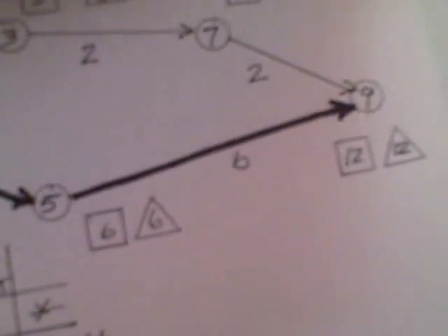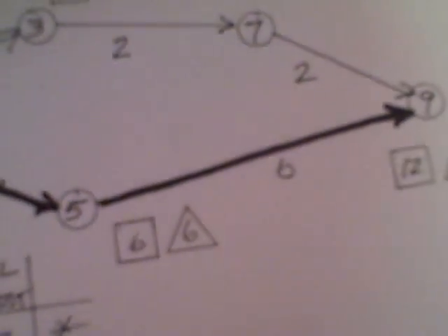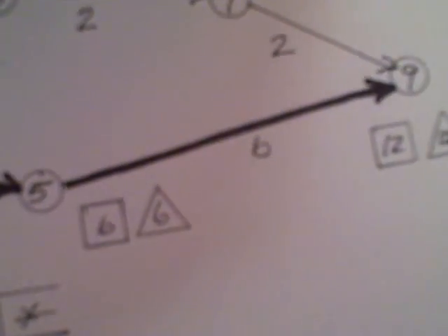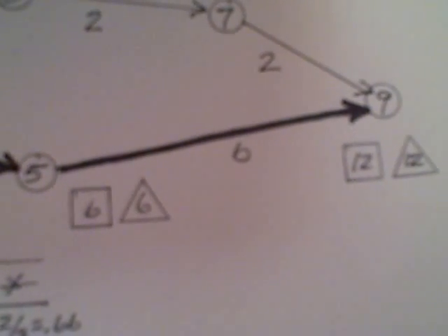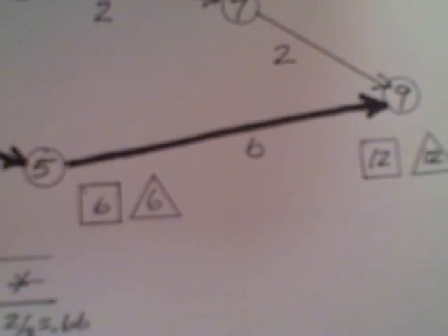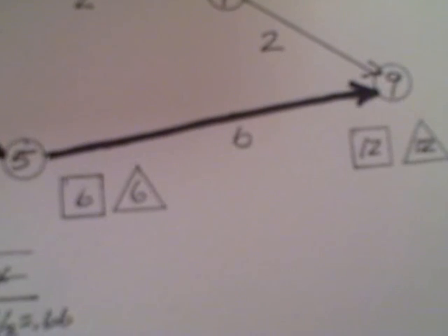And the way we do this, we choose, is based on what we call the cost slope, which is a ratio. It's just like if you're comparing cars in a race. Which car goes faster? The one that has the highest miles per hour. That's miles per hour. In this case, we're going to compute cost per day. So that's the rate at which the cost increases as we reduce the project.